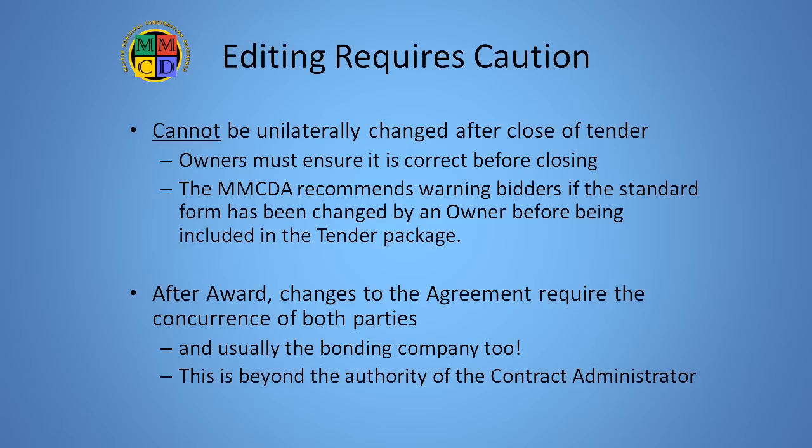A final note on this point is to the contract administrators. As I've discussed, the agreement is not a document that can be changed by one party. This means it is the one document that cannot be altered by contract administrators during the course of the project.